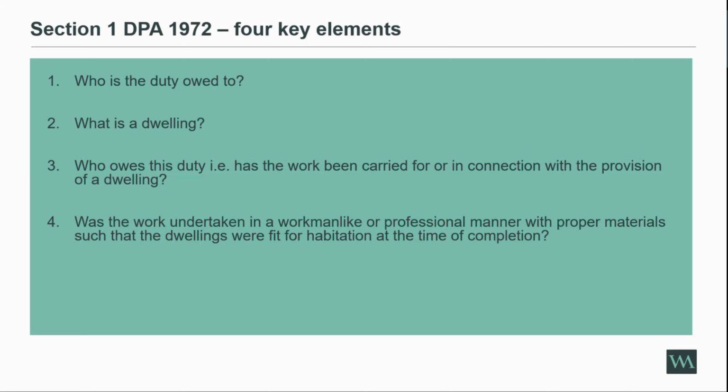But we can also include architects and fire engineers where the role is positive. Those professional services influence whether the dwelling is fit for habitation at completion or not. It depends on the circumstances in each particular case. But on the flip side, if you're not taking on a positive role, such as a building inspector, where you're just inspecting for compliance with the building regulations, then that wouldn't be covered.